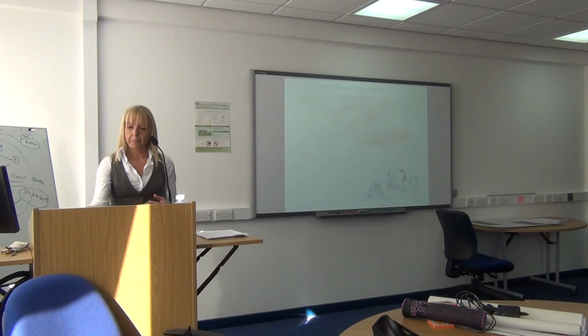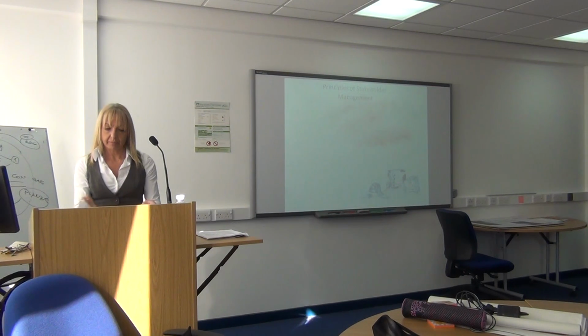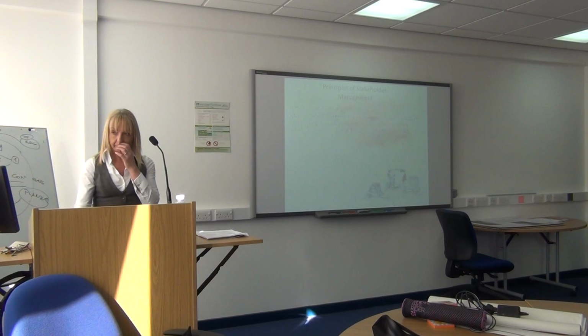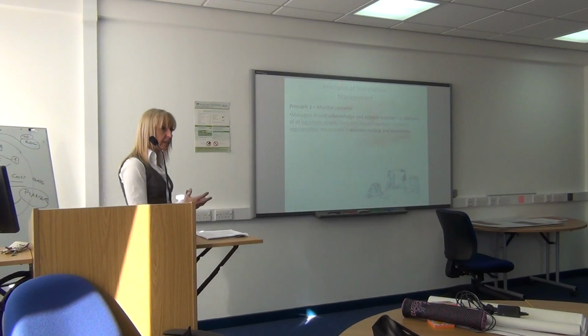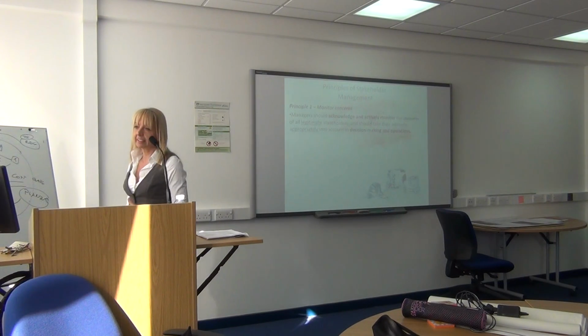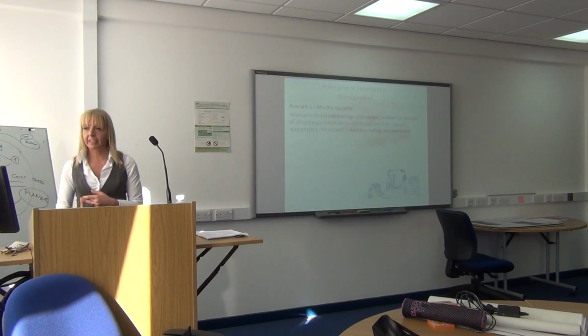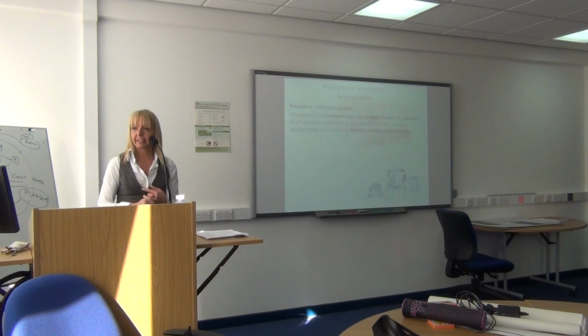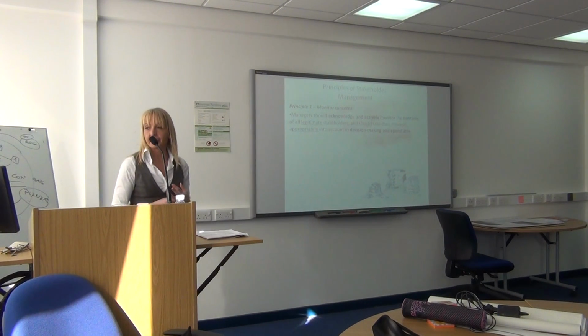So there are, I think, 7 principles for managing stakeholders. Once you've done that, you need to be able to manage them and monitor them. You acknowledge and actively monitor the concerns of the legitimate stakeholders, and you take their interests appropriately into account in decision making and operations.